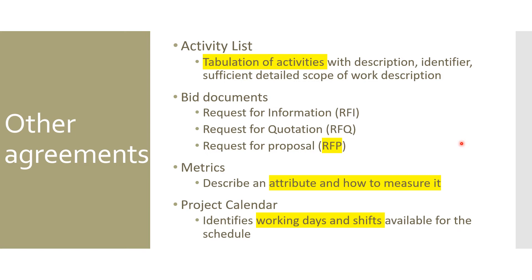Bid documents are another artifact type. They can be a Request for Information (RFI), Request for Proposal (RFP), or Request for Quotation (RFQ). RFP is very common — for example, a government seeking proposals from different IT vendors, or a buyer requesting proposals from multiple suppliers, evaluating them through bidder conferences, and choosing one or two vendors based on terms and conditions.